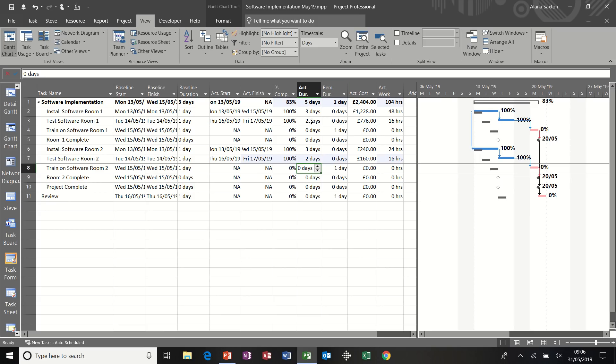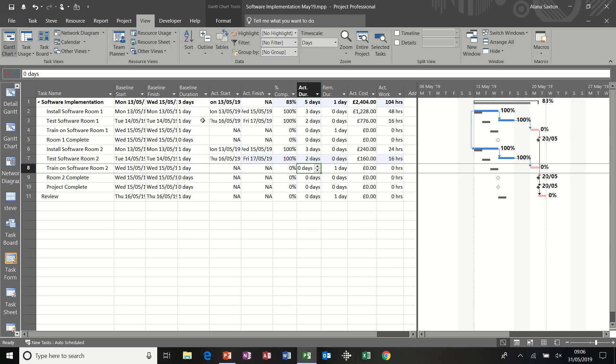Now, whichever column you fill in affects the other column. I'm not a fan of just going down the 100% complete column or starting to put 10%, 20% because it's not really accurate. And if you're always just filling in a task as 100%, what we're in effect saying is that your planned duration is always accurate. Whereas if you're doing the actual duration, it's more accurate. Because if it says two days and it was planned to be one day, you've got a problem there. You were a day over and that's got a cost implication. So although that's a quick way of filling in the percent complete, it's quick, but it's not very accurate. And it gives a false result when you're reviewing projects. So I would avoid that. Although it's not undoable, but sometimes you have to do it for speed, but I would try and avoid that if you can.